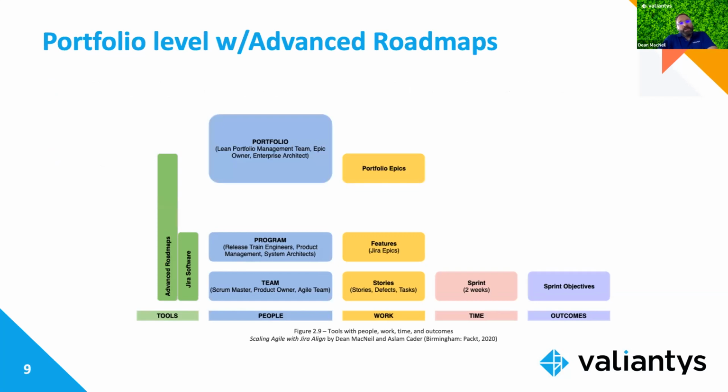Now at this stage, we like to introduce Advanced Roadmaps, because with Advanced Roadmaps, you could really, like I said, get your feet wet at that portfolio level. And this is important because if you've now got coordinated teams of teams working on Jira Epics, which generally speaking are product features, bigger pieces of work that deliver within a business quarter, whereas a user story would be delivered within a sprint. Now you could roll those up to a higher level item, generally speaking, a portfolio epic, or in Atlassian terminology, often an initiative.